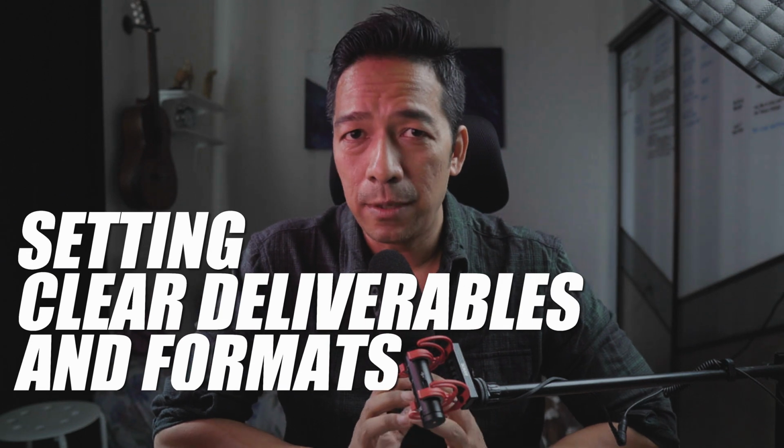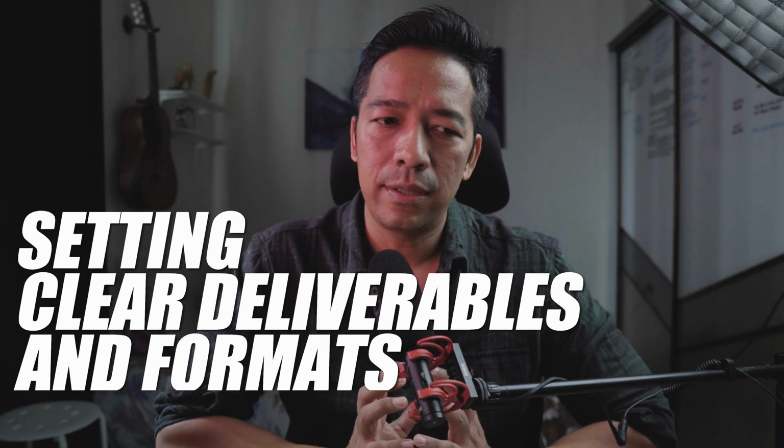Having a clear list of deliverables is extremely important. Even the file format, the size, the dimension. Let's say it is a graphic for the phone: is it going to be vertical format or horizontal format? Because mostly what happens is there are times when you have not confirmed the dimensions. Later, once you have completed your project, the client comes back and says, oh, I did not want this format. I wanted the exact opposite format. And then you have to do the entire changes again and again. So that's again redoing an exercise. So be very clear about your deliverables.